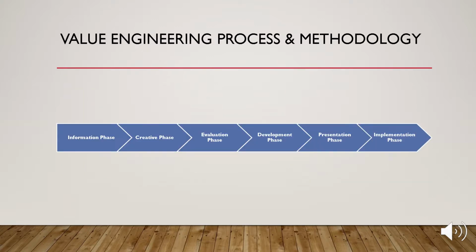Now let's talk about the value engineering process and methodology. There are 6 phases in the value engineering process, and each must be completed before the next one can begin. There is the information phase, the creative phase, the evaluation phase, the development phase, the presentation phase, and the implementation phase.